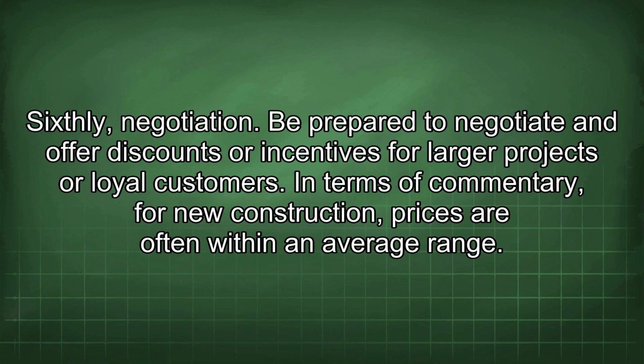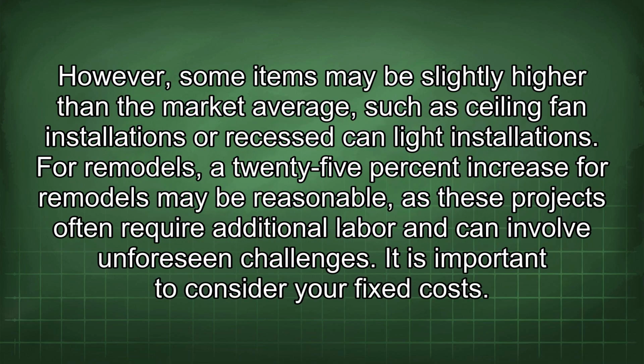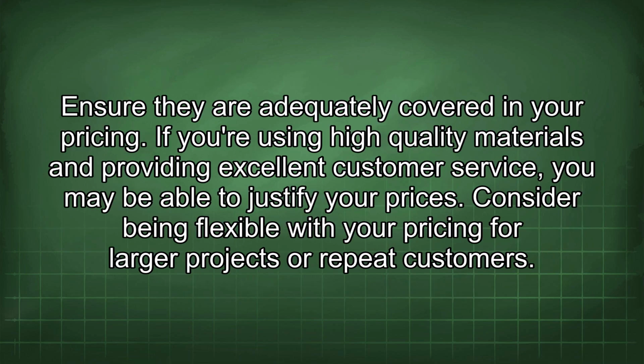In terms of commentary, for new construction, prices are often within an average range. However, some items may be slightly higher than the market average, such as ceiling fan installations or recessed light installations. For remodels, a 25% increase may be reasonable, as these projects often require additional labor and can involve unforeseen challenges. It is important to consider your fixed costs. Ensure they are adequately covered in your pricing.